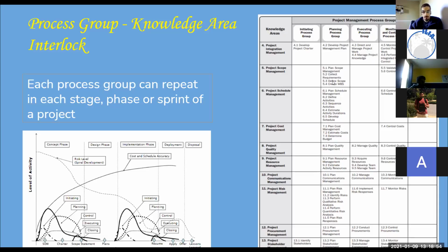And then 3-4 weeks later, they come back to you and say, we also are in the process of hiring counselors. We got a poverty or a low income counselor, a social service counselor. We got a domestic abuse counselor, and we got a drug addiction counselor, right? But that's not your scope. Your scope was low income, domestic abuse, and homelessness. So what happened here is the team deviated from the scope without noticing, that happens a lot.